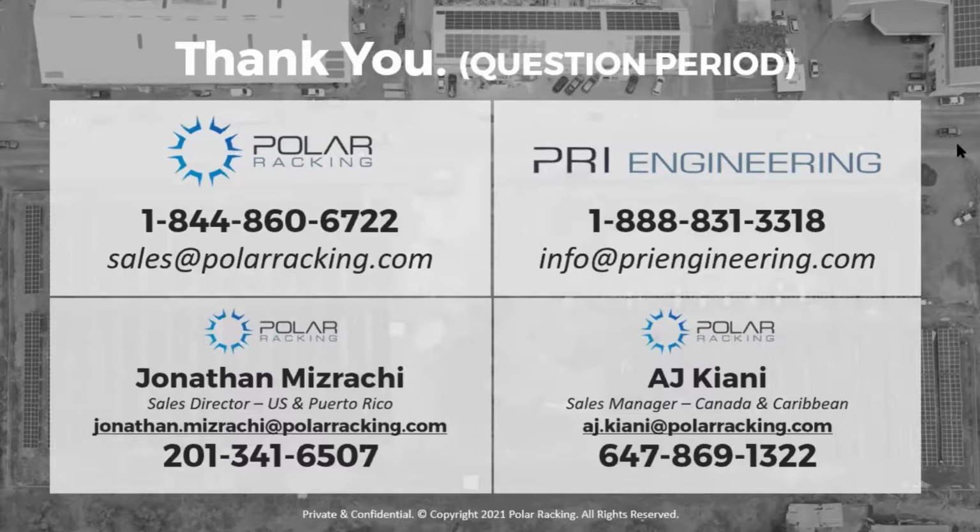We have used earth anchors as a last resort to remediate piles where there's lateral issues. But to be honest with you, in a lot of cases, we only got to that case because a contractor was let to do work unsupervised, and they ended up not following the design, and all other remediations were considered to be too costly. So we used the earth anchor because that was the best means in the situation we're in. So I wouldn't really say that earth anchors should be a status quo foundation design, but they definitely could be used as a remediation option, as a very, very, very last resort.